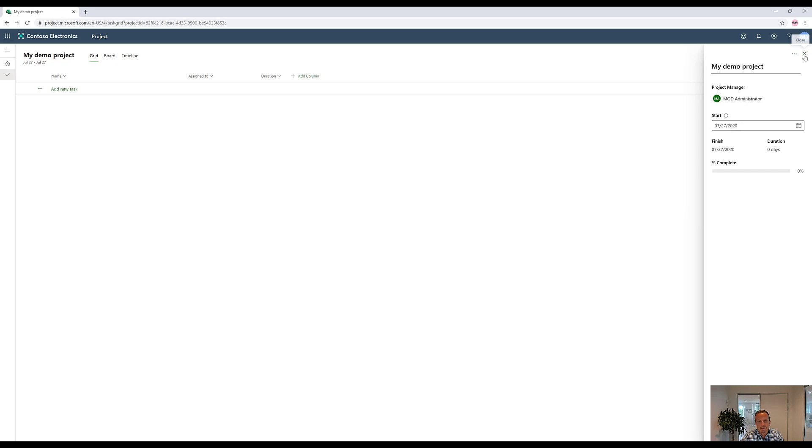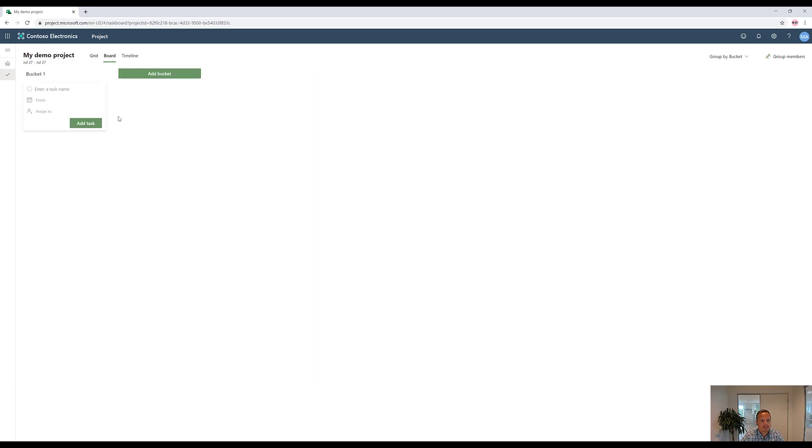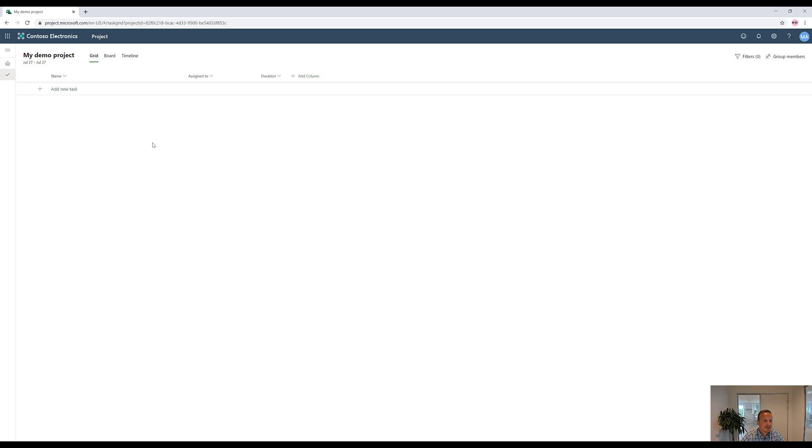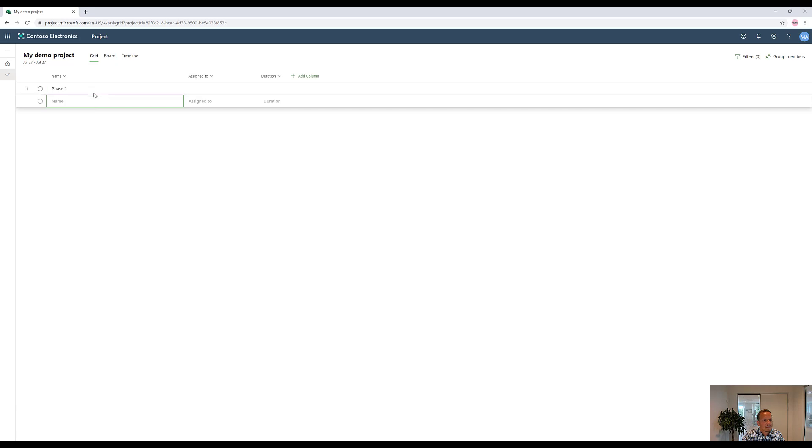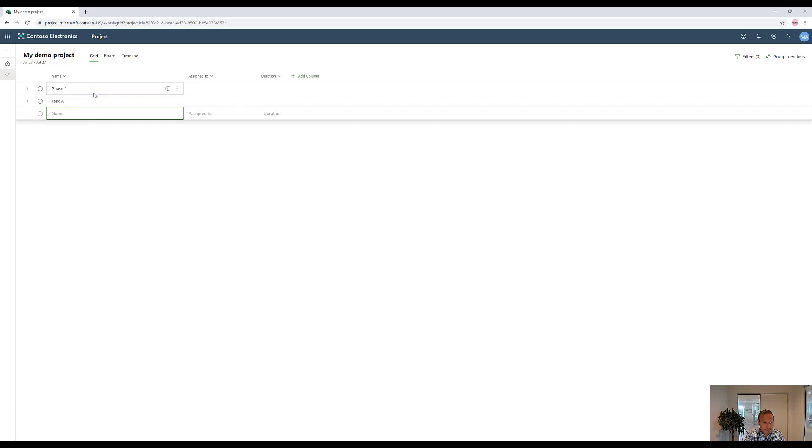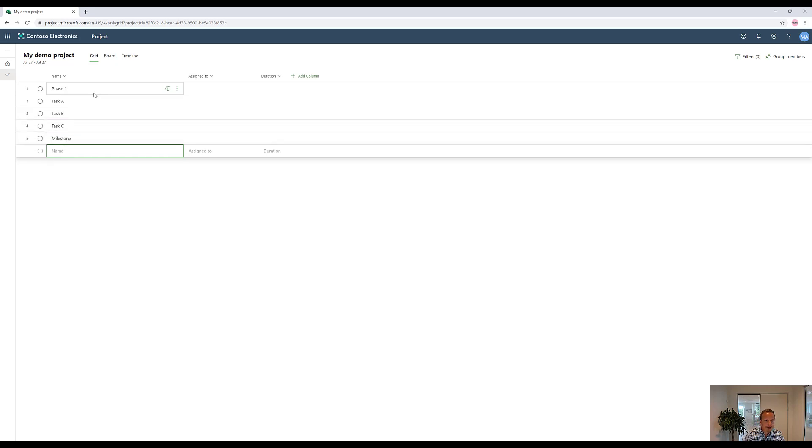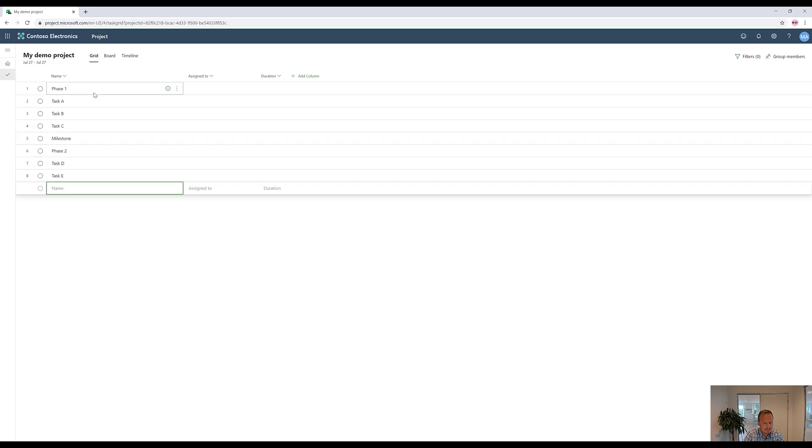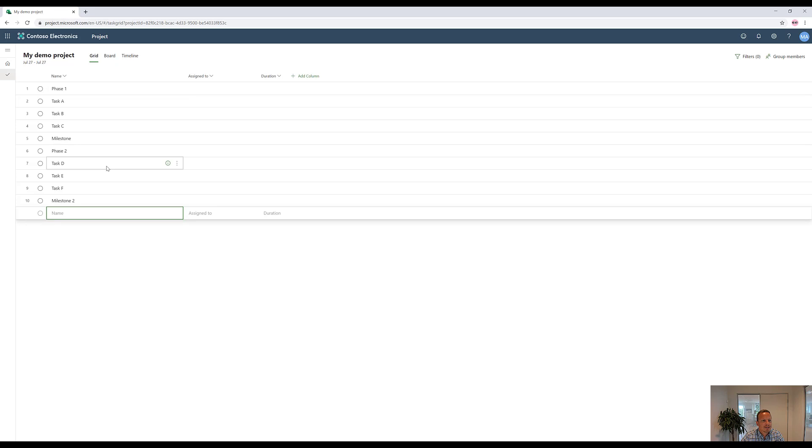Then we have a grid view or grid approach to plan our work. We have a board approach and the timeline approach, sort of the Gantt chart. If we click on grid, we can click on add new task and perhaps create a phase. Phase one could be the number one. Then we have task A and task B and task C. And we might also have a milestone at the very end of this phase. Next up, we have our phase two with task D, task E and task F and another milestone like this.